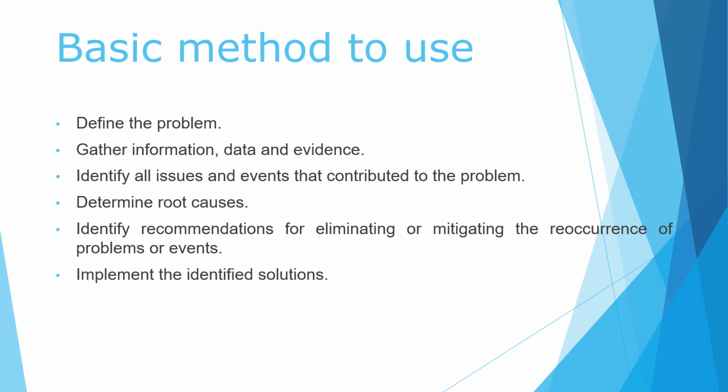Basic methods: define the problem, gather information, data and evidence, identify all the issues and events that contributed to the problem, determine the root causes, identify recommended actions for eliminating or mitigating the recurrence of the problems or results, and implement the identified solution.